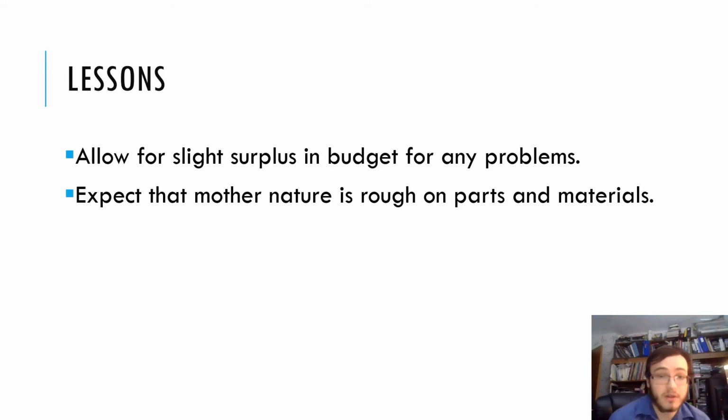Some lessons that we learned was to allow for a slight surplus in budget for any problems that might arise, as our budget was quite good for everything that we had planned for, but we were not ready to need to rent the lift truck an extra time and also purchase the shells for the durability. We also need to learn to expect that Mother Nature is rough on parts and materials, and we need to strengthen our units before we install them, just so we can prevent this in the future.